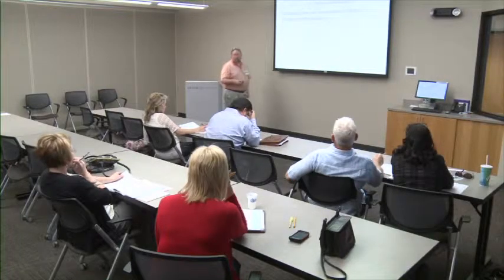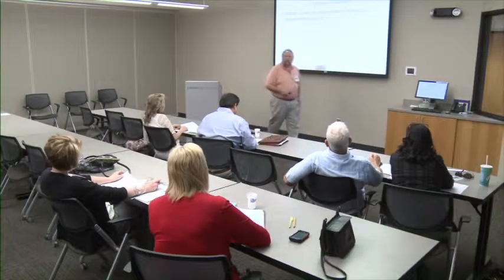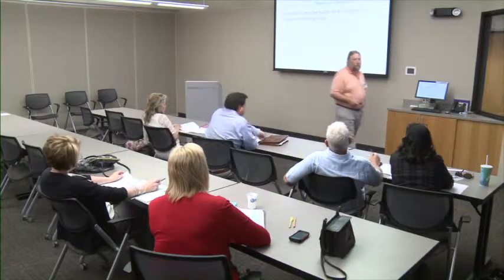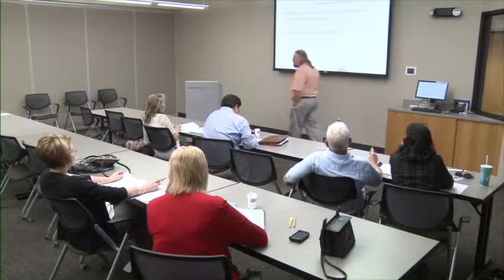The time convenience, what you're going to look for, okay? Essentially, in a schedule, all we're talking about is it's expressed in work days, the days we actually work. Our time schedule, how many working days we have, doesn't actually reflect how many calendar days we may have. And we express completion in terms of days expired. Okay, so what we've already done, not what we're looking to do. And so which means we have to have a beginning day 0.